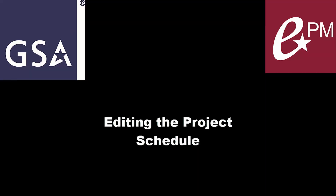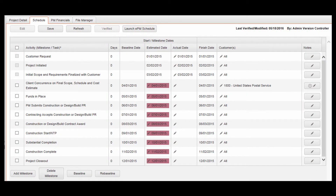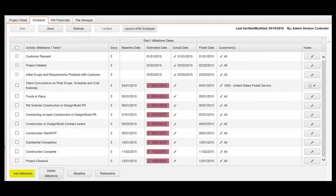Editing the Project Schedule. With the appropriate project open and the Schedule tab selected, click Edit in the toolbar to edit the project schedule. To add a milestone, click Add Milestone and enter a description in the Activity column.